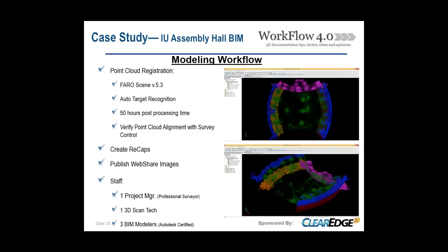So again, we had to phase this job. We were sending crews to the field, and then data was coming back. Back in the office, once we had the survey reduced, balanced and checked, we would start our registration process. We were using Ferrocene. We did target this job. We're still strong believers in field targeting. To help protect our targets, we utilize reference stickers with unique numbers so that we can reproduce sphere targets if we need to.